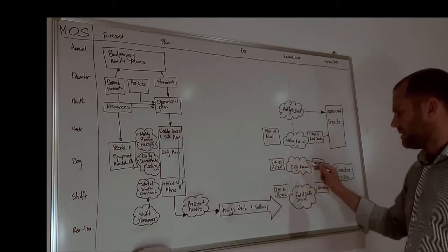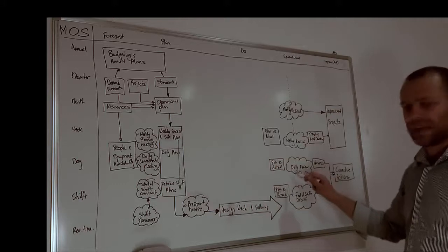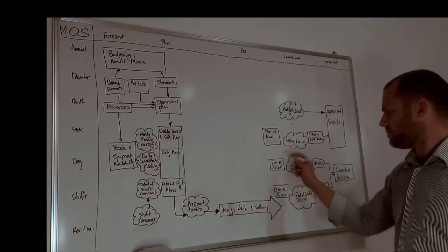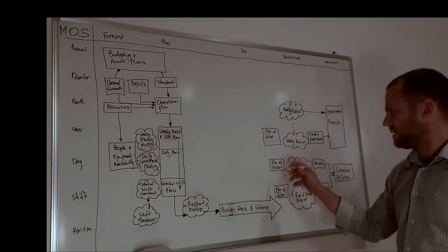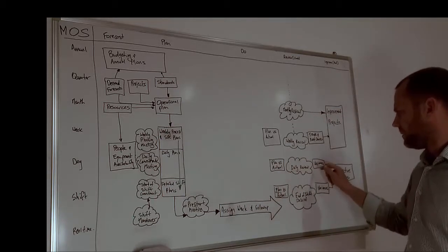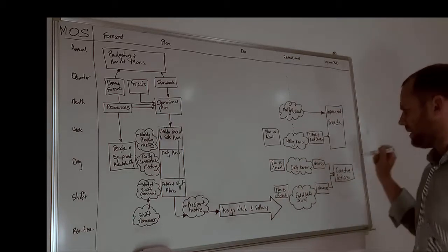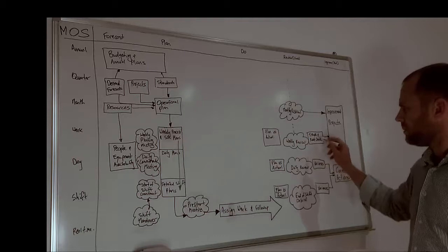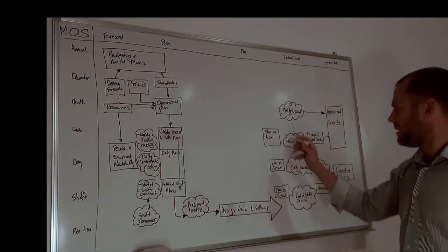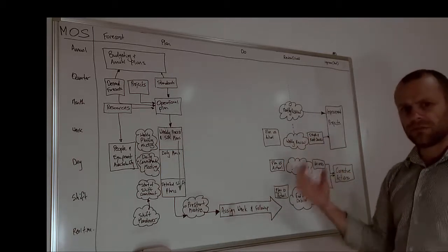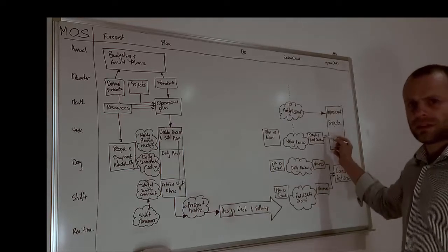Likewise, there tends to be, in a lot of sites, a daily review meeting where the superintendents and the managers get together and talk about the plan versus actual, think about variances and discuss corrective actions. That should probably be done weekly as well, where we get a bit more into trends and root causes and we start thinking about improvement projects.